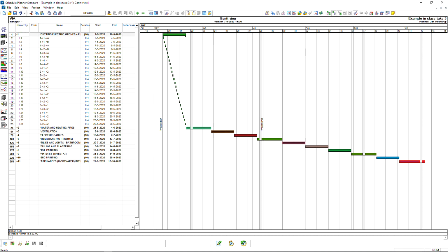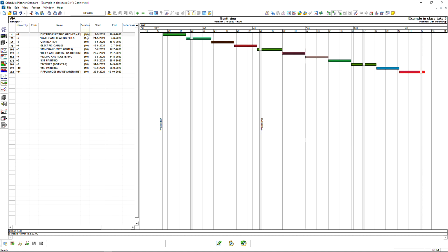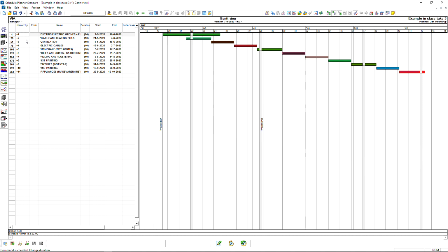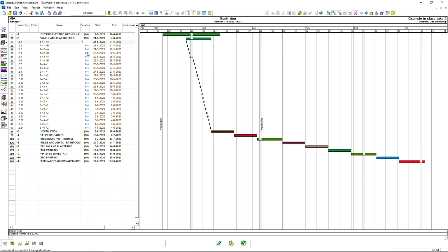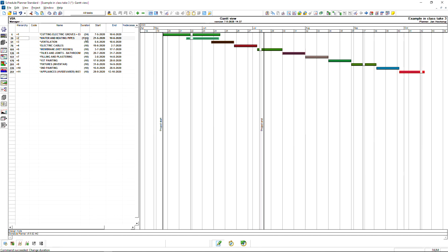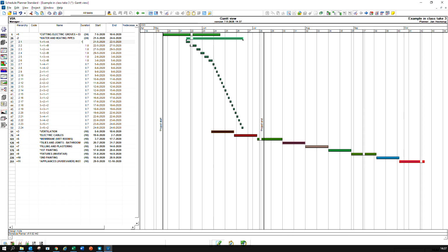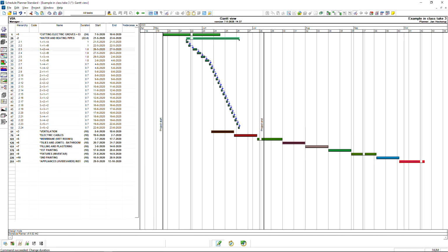For each apartment, you have one line. The standard duration is 10 days. I can just change it to 24 days if I want to. Subsequently, it alters the duration of the individual apartments. I could also simply change the duration of the individual apartments with 1, but that takes a little bit longer. I think it's by far faster to just write 24. And now it's already screwed up. So be careful with this.